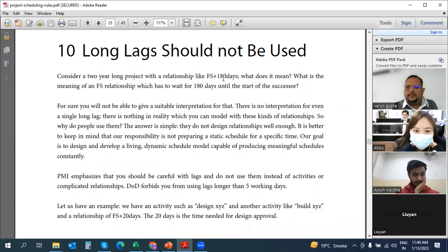That is what is called a lag. And lead is the opposite of lag. The first activity is, let us say, 1st to 10th January. The second activity is 8th to 12th January. Then you will say FS minus 2 days, so that it starts from 8th January. So this is how the difference goes.